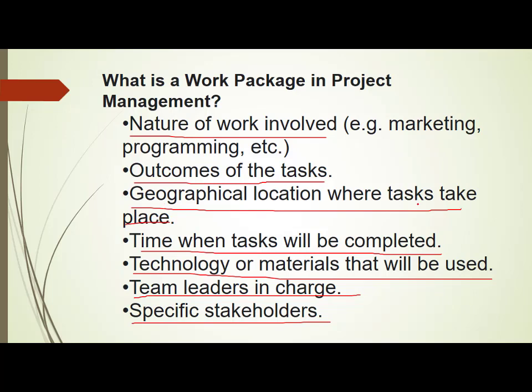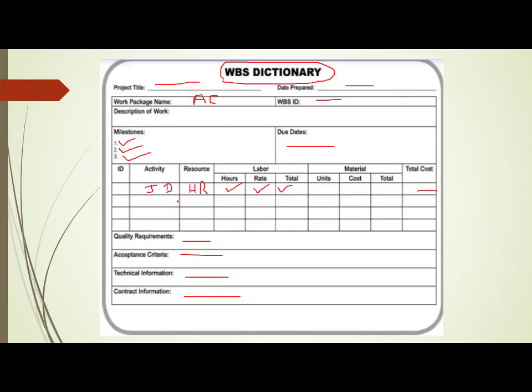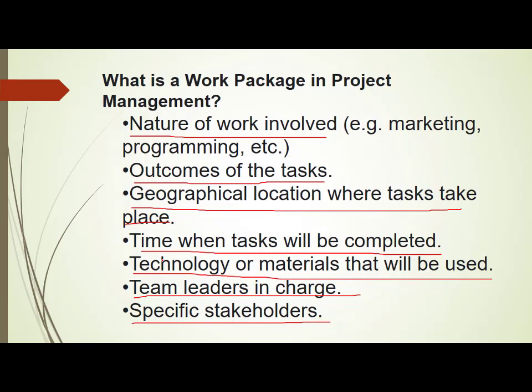Geographical locations where tasks take place. In this case, there is no mention of the geographical location. For example, suppose you are doing an IT project, and you are doing a small package called designing a login screen. That login screen designing is not done in India. It is actually done in the US Development Center. So what is the geographical location? The geographical location is the United States Development Center. So you have to mention that geographical location.